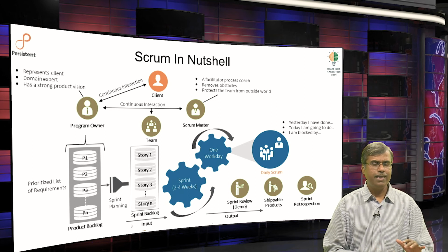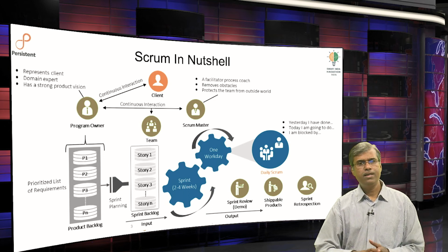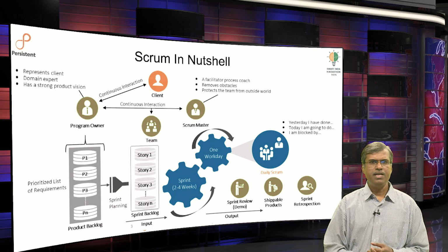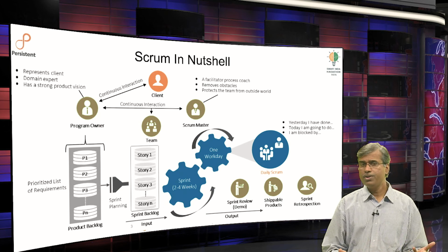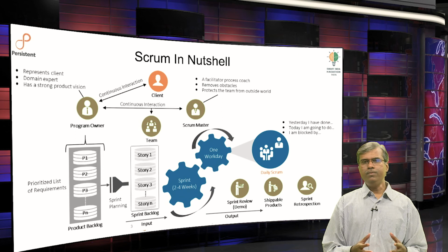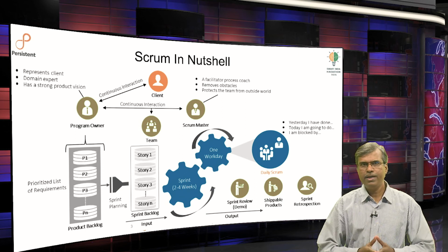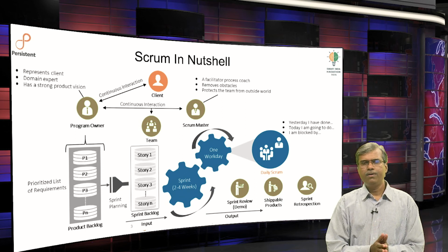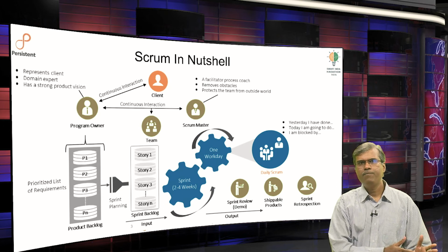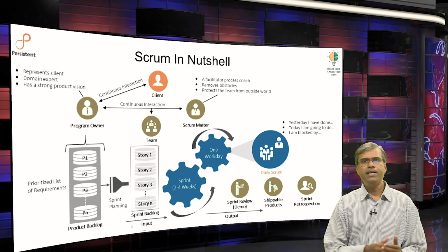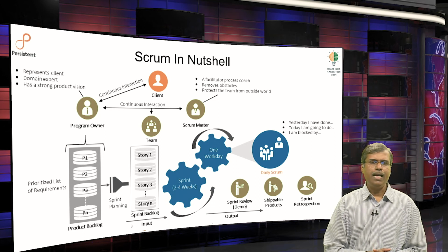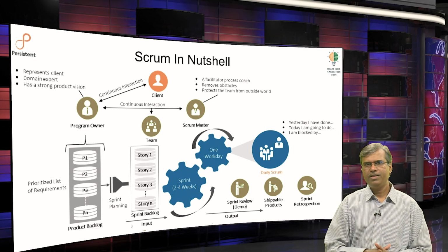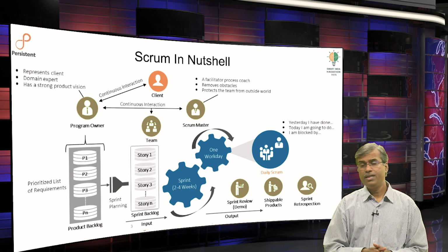But since Agile exists for the benefit of end users, you need to really see whether the change is really important and critical, and if it can wait for the next sprint, you may want to negotiate that with the product owner. So, if it is a change that must be accommodated in this sprint, you go back to your product owner, revisit your plan, and then take up this change in lieu of something which is of a lower priority from your backlog, right, and decide the implementation of the change. This is how a change could be accepted.